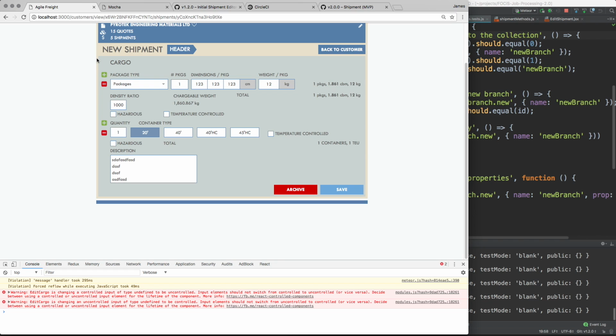So the stakeholders should be focused on either describing problems or describing opportunities, but not so much focused on how the solution should be implemented. That's one of the rules of Scrum. Nobody tells the development team how to build what they're building. It's their job. They're a cross-functional self-managing team, and they should be encouraged to make their own decisions about how to implement something. And they're frankly the ones with the most information, the most detailed information around them.